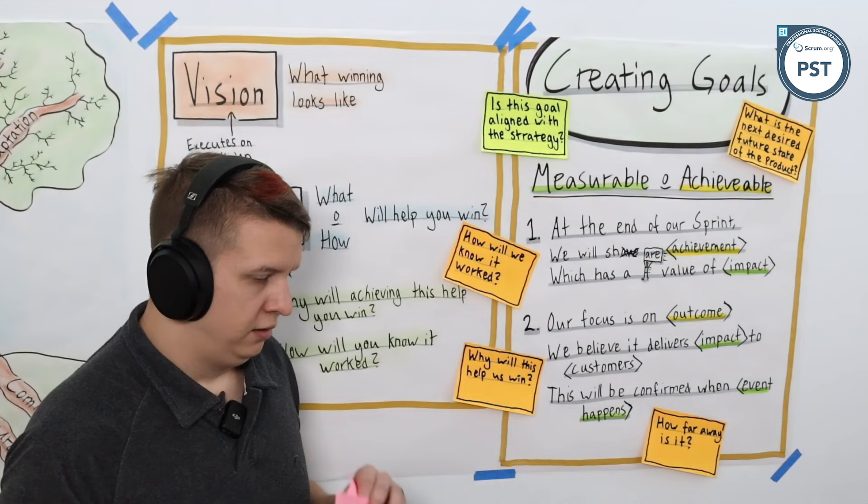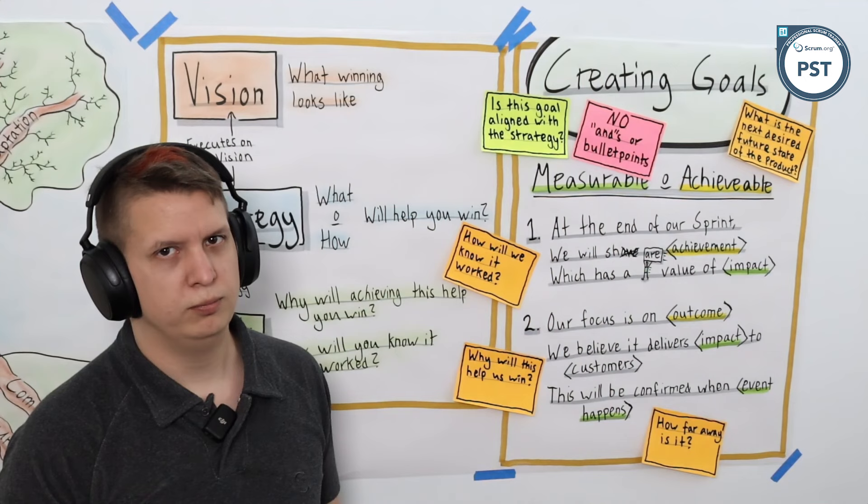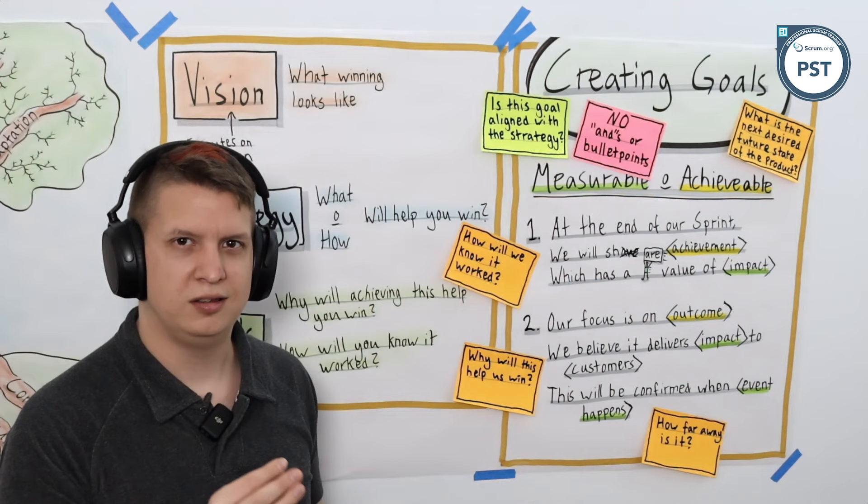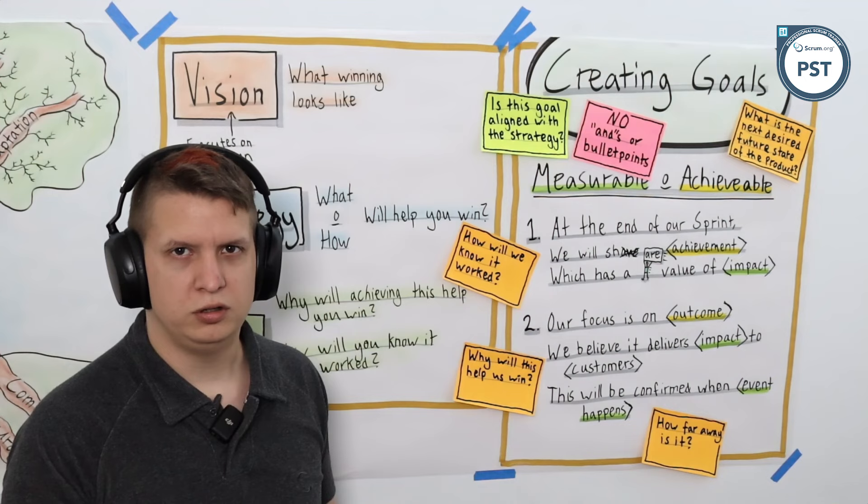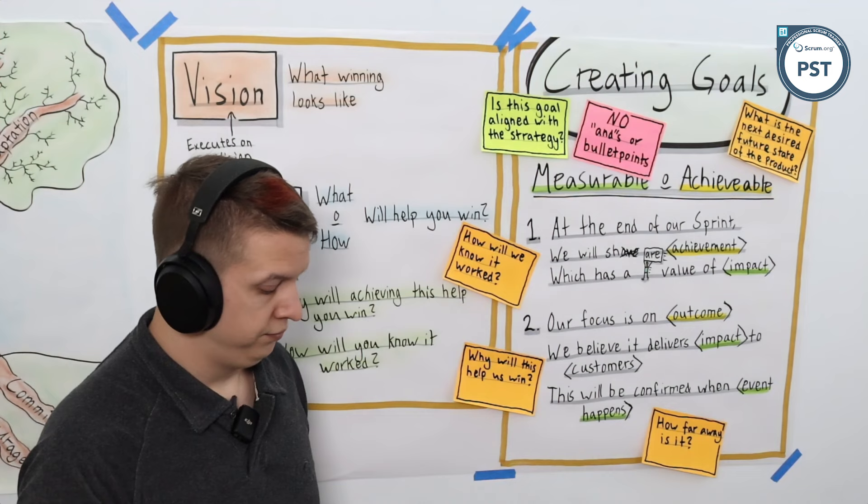And then some words of caution, both for the product goal and the sprint goal. First of all, please, no ands or bullet points. It should be focused. It's the goal. It's the thing you're committing to. Whenever you add ands and or bullet points, you're diluting the purpose, you're diluting your focus, which means you're actually less likely to achieve any of those things.